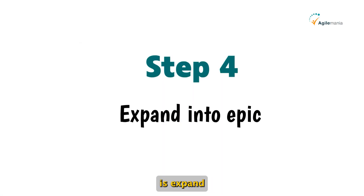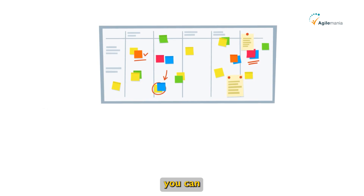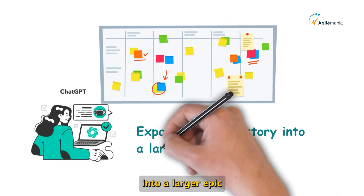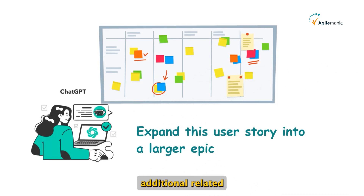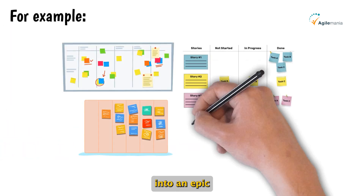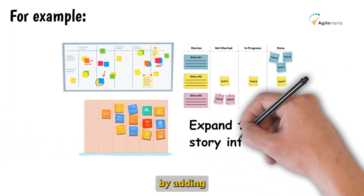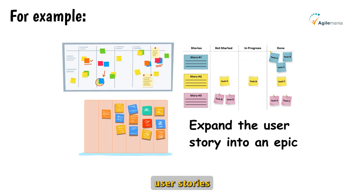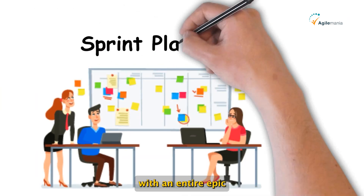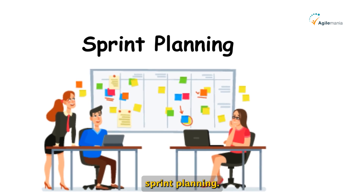The next step is to expand into an epic. Once you have a well-formed user story, you can prompt ChatGPT to expand it into a larger epic by adding additional related user stories. For example: 'Expand the user story into an epic by adding 2-3 additional related user stories that would be part of the same epic.' This provides you with an entire epic to bring to your sprint planning.